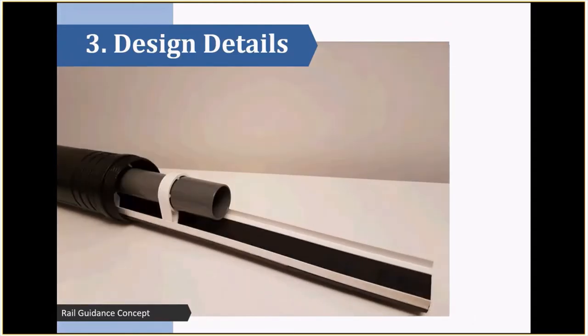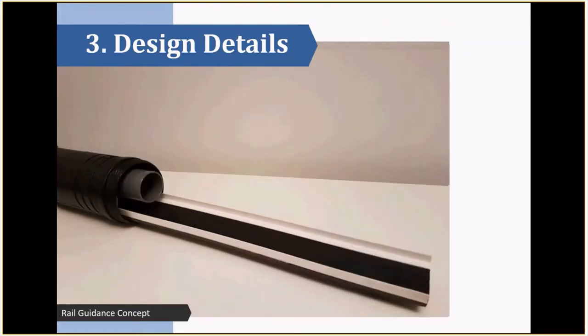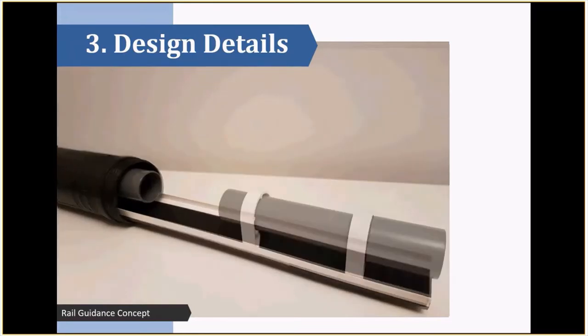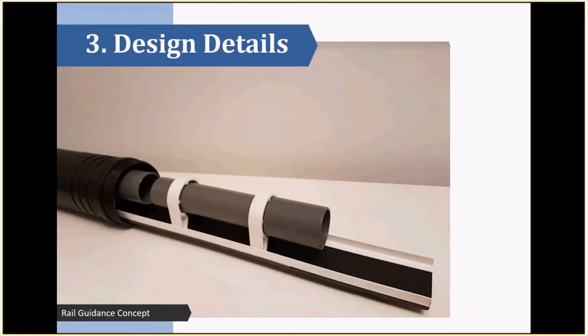to be undertaken was for each of the sections to be pushed into the tunnel with very tight tolerances between the pipe and the tunnel wall. And also, it ensured that each section of pipe using the same size pipe straps and supports could be pushed into place in alignment with each other, ensuring that the spigot and socket sections would align whilst the site team were working at the downstream end of the pipe.